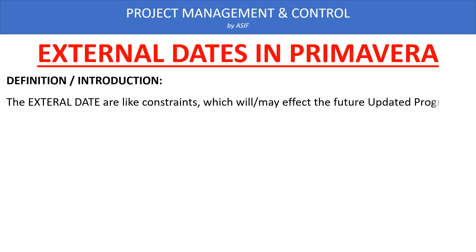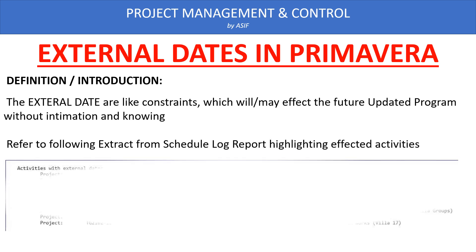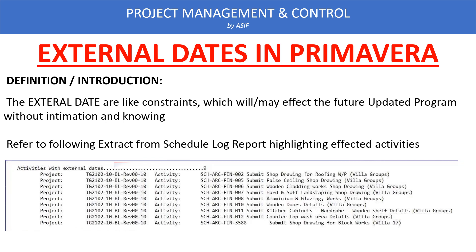The external dates will affect our future updates without our knowledge, because they are generated without our awareness. First we want to see how the program is affected due to external dates. In the schedule log, it will show you the activities and the number of activities affected due to external dates. In this program, the schedule log shows that 9 activities are affected because of these external dates.